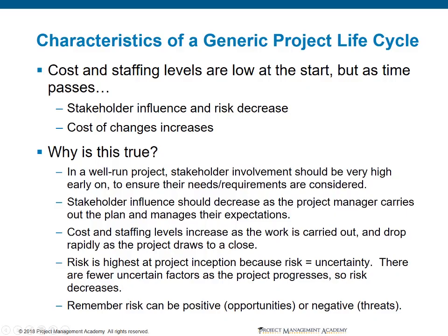The cost and staffing level will increase as the work is carried out. However, as a project draws to a close, it will drop rapidly. A very important note here is that practitioners and the people working as members of the project team will not just be released as soon as they're done working. This is going to be very methodical and deliberate in how we approach this. Anytime somebody completes their piece of the project work, we will inspect their work to ensure that it was done properly. We will gather lessons learned from that individual, and then we can go ahead and release them. But nobody's just going to walk off the job site.